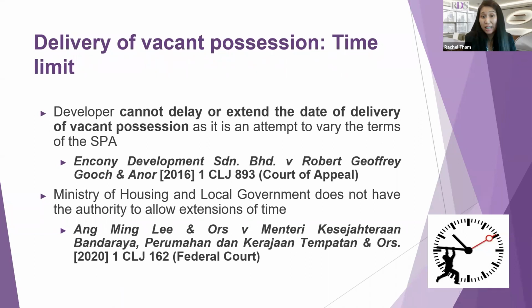The position is made clear in the Court of Appeal case in Ankuni Development Sdn Bhd and Robert Geoffrey Goch and another. The developer cannot delay or extend the date of delivery of vacant possession as it is an attempt to vary the terms of the SPA.